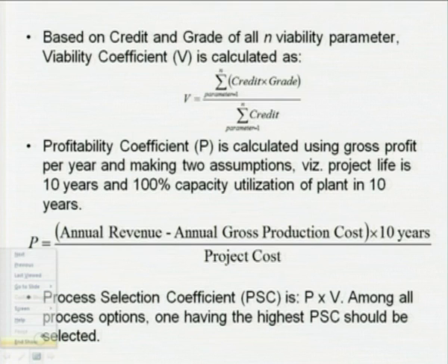There have been instances where some projects were required to be relocated even after site development was over and equipment for erection was ready for installation at the site. That caused not only a tremendous loss in terms of capital, but also delay in project startup, and such delay is disadvantageous not only to the project owner, but also to the people.